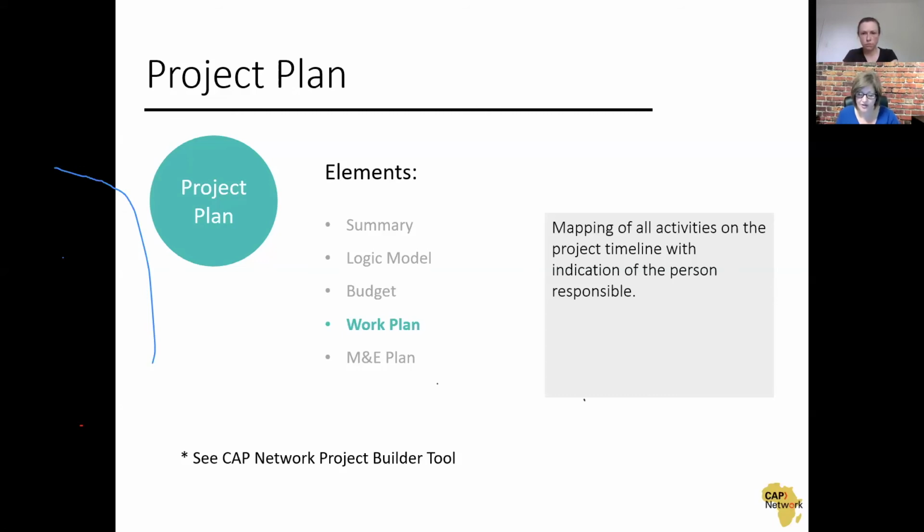So where you think your project is going to cost more in administration and oversight than the funder allows, I would definitely put that in your cost share so that at least you're being upfront with them about what it really costs, so that they can see the difference between what they are being asked to fund and what the actual costs are. And that's a great way to include cost share.